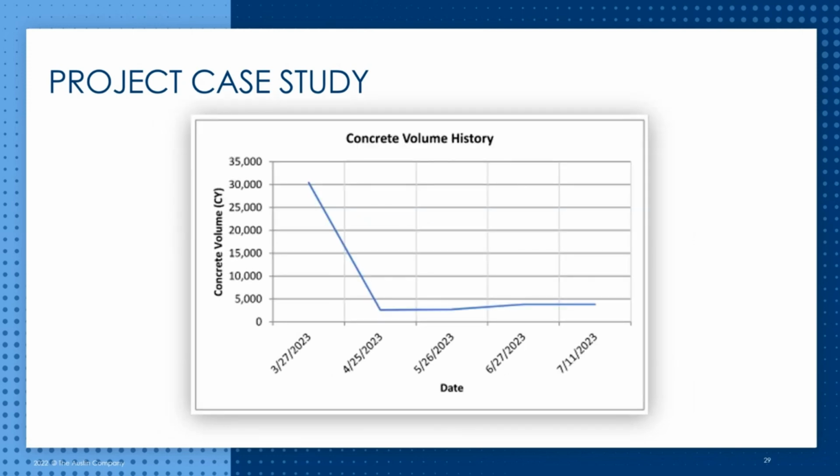This case study project also highlights another corollary advantage of BIM metrics, which is that computer modeling issues are highlighted and more easily identified. Look at this chart, for example. The early phase concrete volume data indicates a yardage which is astronomical and far above what is to be expected. After a further assessment of this anomaly from the harvested data, it was found that numerous concrete elements had been incorrectly labeled in the Revit file. Once identified, of course, the error was quickly fixed.